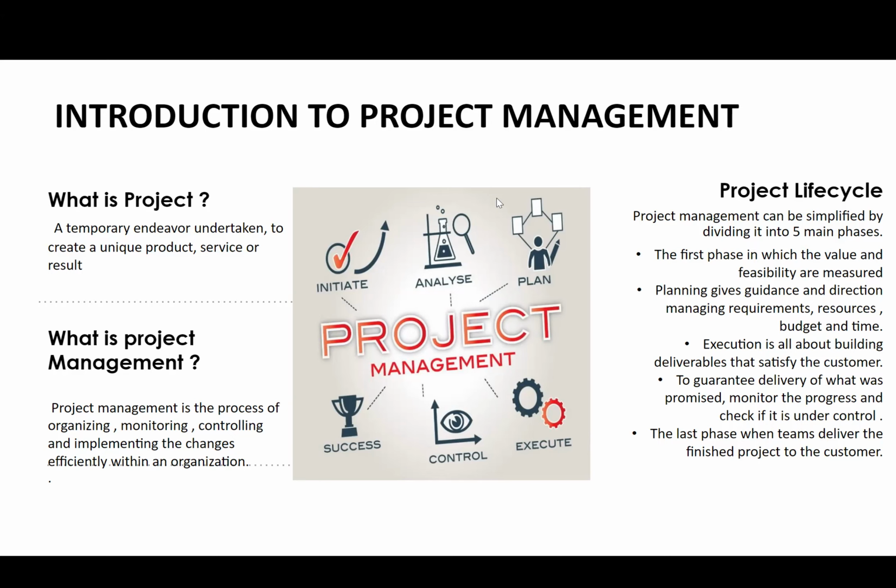Once you go live, you are reaching the end of the project. People and customers can log on. And then the last phase is when you close the project and give an account of lessons learned. Projects don't always go to plan. In the last phase, you analyze the issues you faced on the project, the risks that were involved, the things that went well and those that didn't. You sit together with your team and pull together a lessons learned plan.